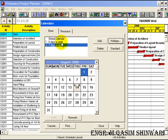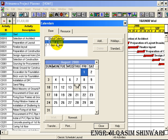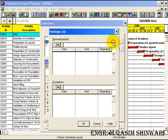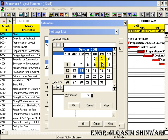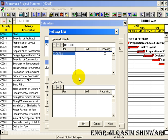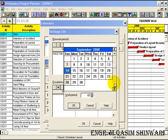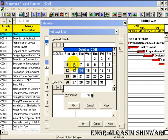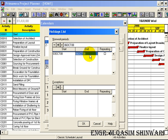Let me define some non-working days in the '6 days a week' calendar. Click on '6 days a week', go to Holidays, and click on the Add icon. The first holiday will be the Eid holidays, from 3rd October 2008 to 6th October 2008. It will not be repeated as the Eid holidays change every year.